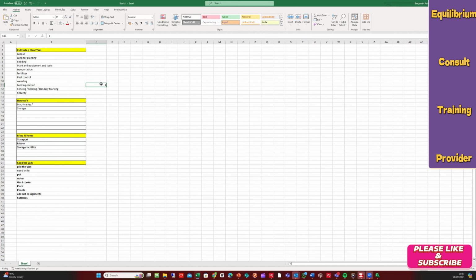Sequence of work is basically how you want to carry out those tasks stage by stage, one after the other. So they will just say work sequence. My work sequence is that the first one is number 11. That's what I want to do first. So land acquisition, then what goes next? 4. We have to secure the land. Okay, I think next is 4. So after getting the land, you need to have a portion that you want to plant on. It might not be the entire land you want to plant on. So land for planting. I think that's why that's there.